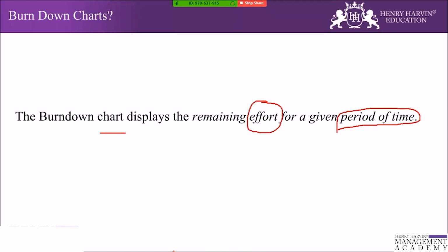So there are different ways to create those burn down charts, and on the basis of that we have different ways of understanding what information these charts convey. The charts are highly useful tools used to monitor completed work and work that still needs to be done during the designated time frame. However, as useful as they are, burn down charts have their limitations. They cannot, for example, clearly or effectively measure work that is still in progress, and they only measure what already has been completed.